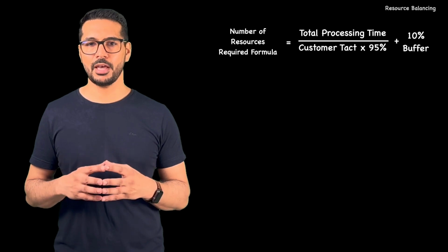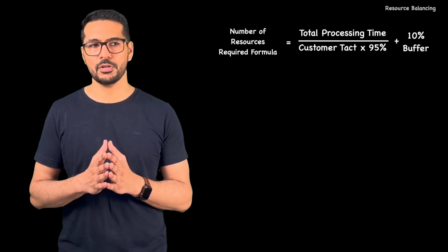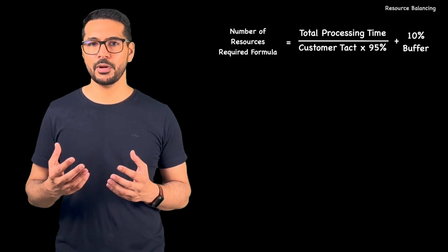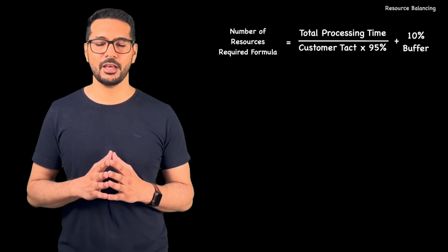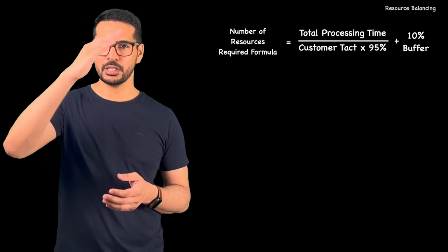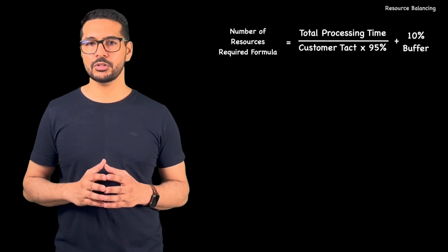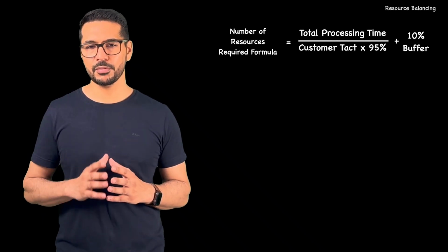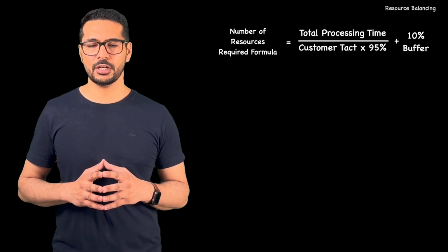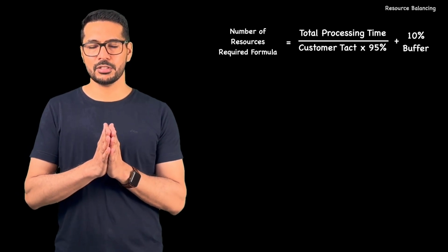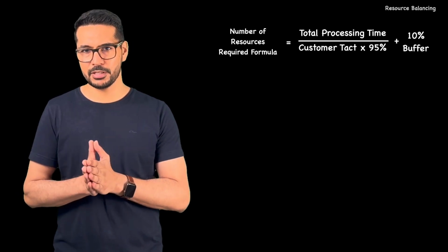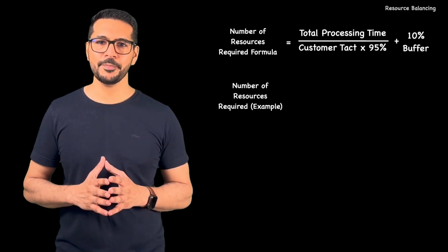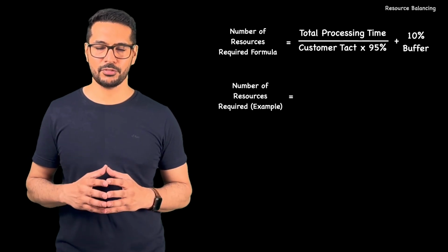There might be some errors in the calculation when we calculated how much time we required for the task, or there might be some undocumented tasks that people have to do, or there can be slight deviations in the demand. In order to cover a small increase in demand, we always keep a little bit, 10 to 15%, of buffer, so that our tasks are not getting stuck somewhere because of lack of capacity, so that they are flowing very easily through the system.